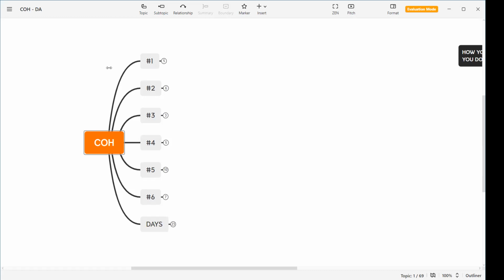Then you say, as you hear from the bank, that's a brilliant idea. Help me to get started to add new customers and add accounts against them. So you agree with that, and you decide that in the first few days, I will deliver 2 modules, that is account opening and adding new customers. And say, for example, after delivering in 15 days, you decide on 2 more weeks, I will work and we will deliver 2 more new modules. Again, after that, I will add 2 new modules.